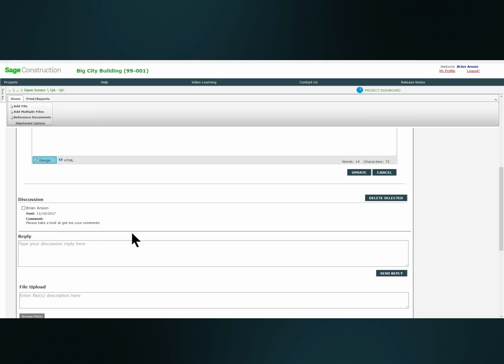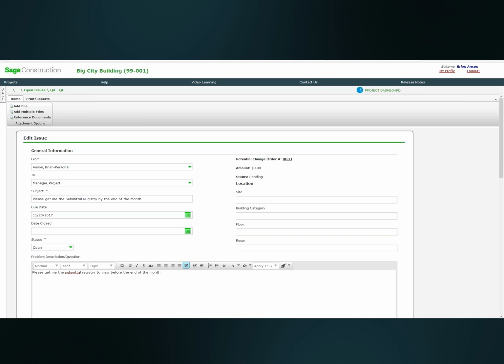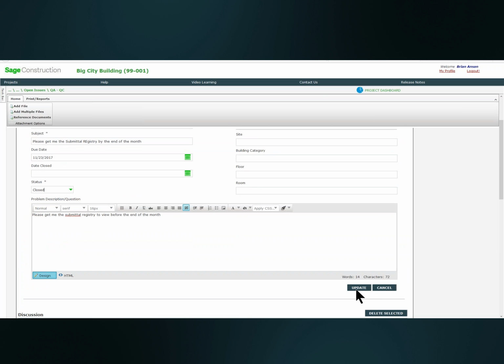Just know that whenever this is able to be closed by the originator, you can close this on this specific one. You can say looks great. Closing. So we'll just close this loop out. I'll post that again, thinking further down with your closeout documents, and down the road you might forget when you said what. That is now date stamped, and I'm going to go ahead and close this one here. You don't have to fill in the date; it will be filled in when I hit update.